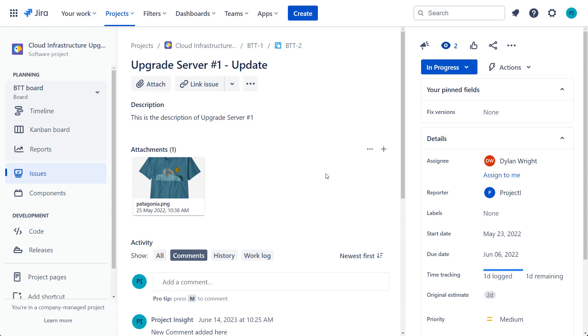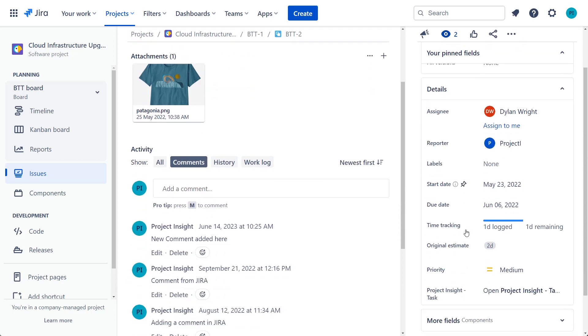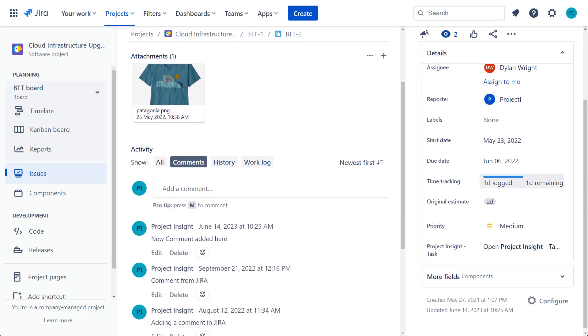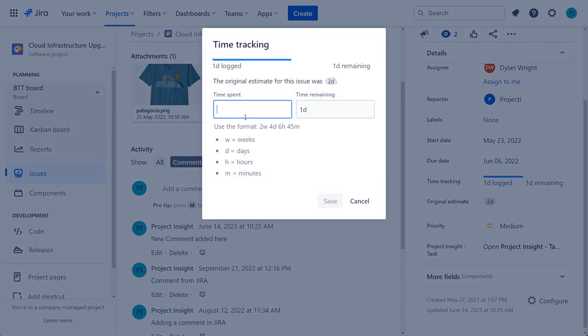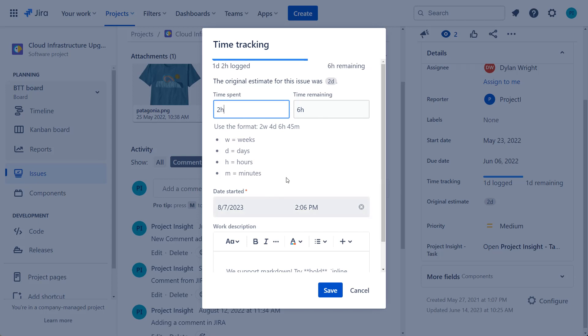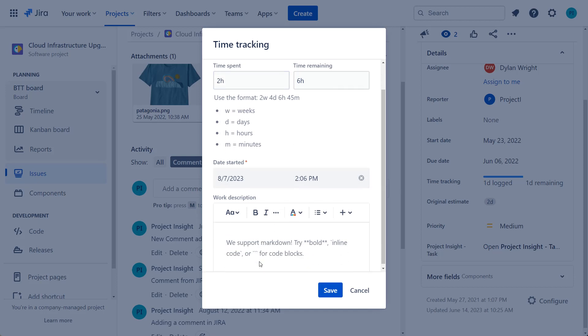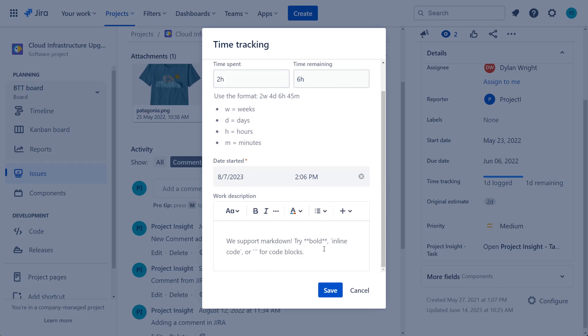To update the time entry, you just go in and say time logged. I'm going to add two more hours spent here. You can put in some description here as well. I worked on software development, let's just say.